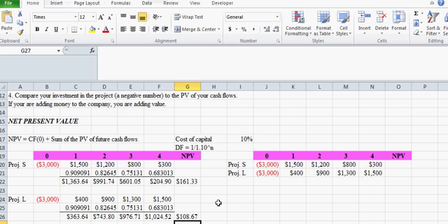So as we evaluate net present value, if we're comparing 2 projects, we want to select that project which has the greatest value as long as it's 0 or above. If it's not greater than 0, then you're losing money on the project and shouldn't do it.